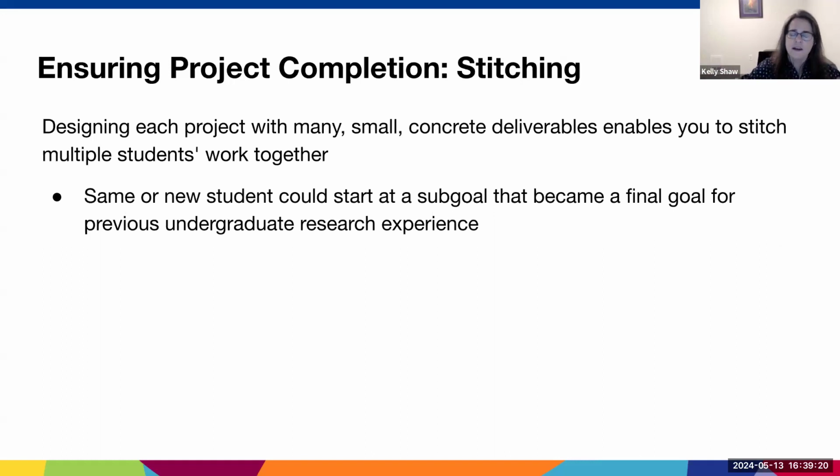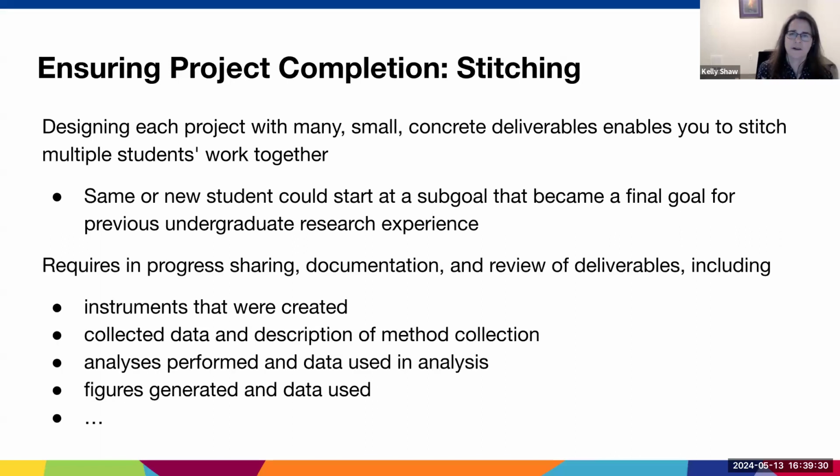So in order to do that, if you design each student experience with small concrete deliverables, you can stitch each of those students' experiences together. This requires in-progress sharing, documentation, and review of deliverables, including instruments that were created, data that was collected and how they were collected, analyses that were performed and what data was used for that analysis, figures generated and data used for those figures, etc.